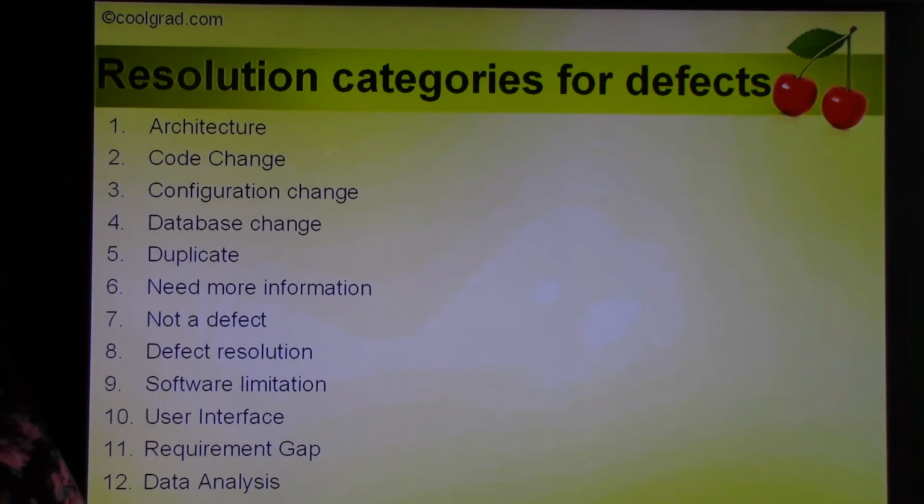So it has to come in the form of a change request, and they have to identify how much time it would take to implement this new change and functionality. Once the change request is approved, they change the functionality by logging a defect. That's usually the fastest way. They log a defect and then fix it. So it was changed through this change request process. I have a whole video about change management, so you can watch that and learn all about how change requests and change management work.